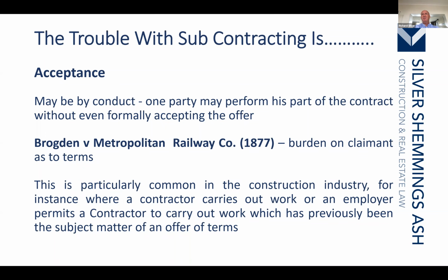And indeed, if you're dealing with things like lift companies and piling companies, those terms can be extremely favourable to subcontractors. So this is the biggest issue that arises generally on construction contracts with subcontracts, is what is the subcontract? Simply because there is no signed order and one needs to deal with acceptance.